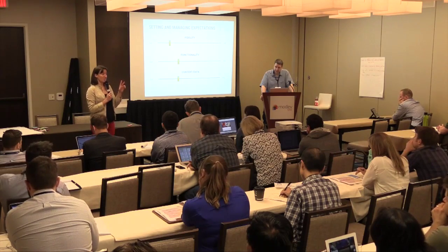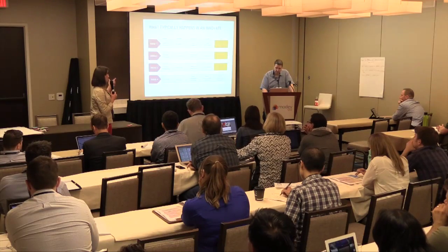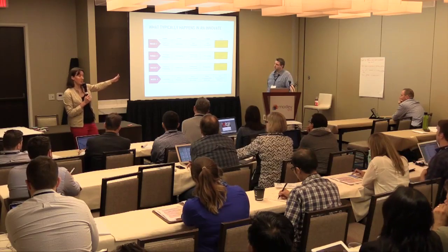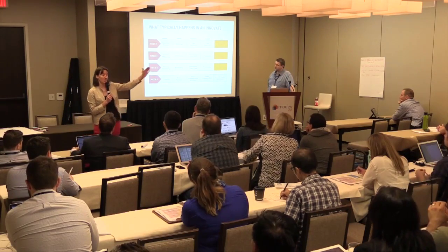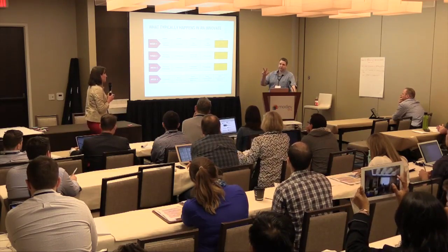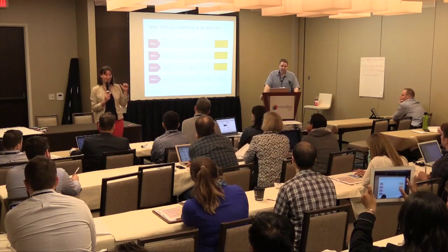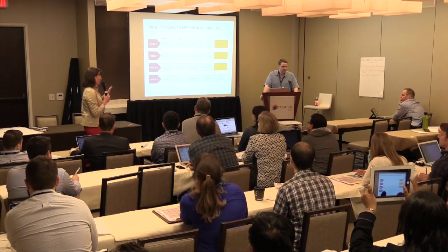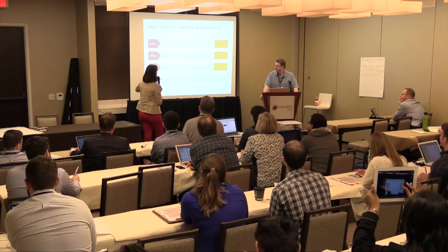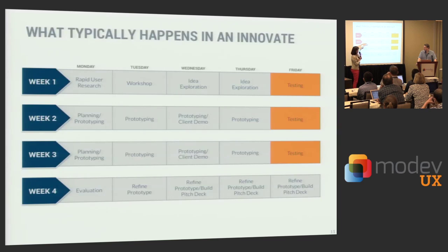In these last 2 slides, we showed you a lot of process stuff. Can we go back up one more, there we go. This one is really how our process works. Typically we plan on Mondays, we demo on Wednesday, we test on Friday. So for developers, that's basically a 3-day sprint. Yeah, it's a 3-day sprint with a pushy product manager and designer hybrid who's just a pain. Oh wait, that's me. If you can't see it from back there, we'll put these on SlideShare. So, it's this quick difference.